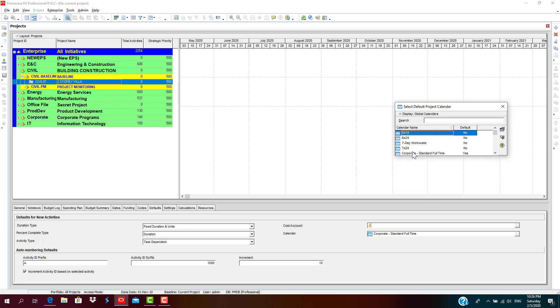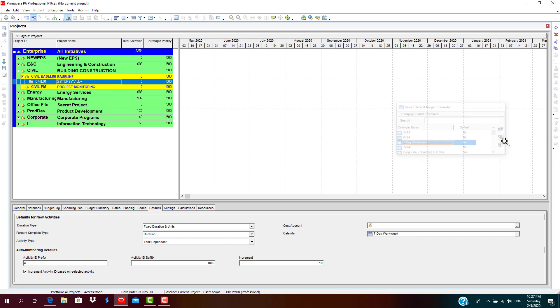For our construction project of a two-story villa, we can work seven days, so I select seven-day work week calendar and it's been selected and assigned. So let's open up our project program. Right-click, open project.